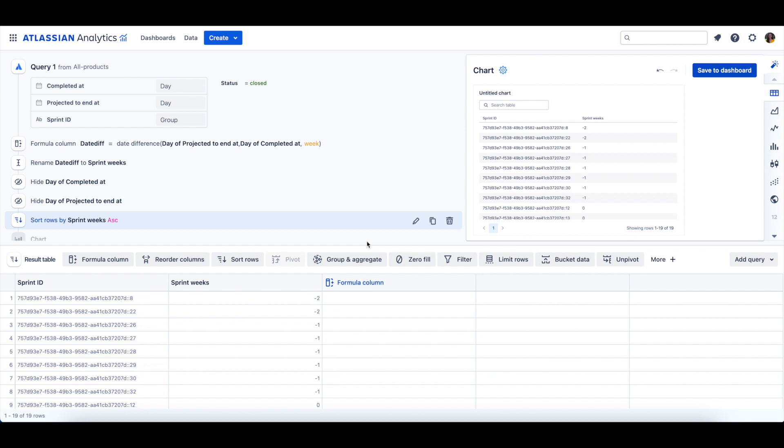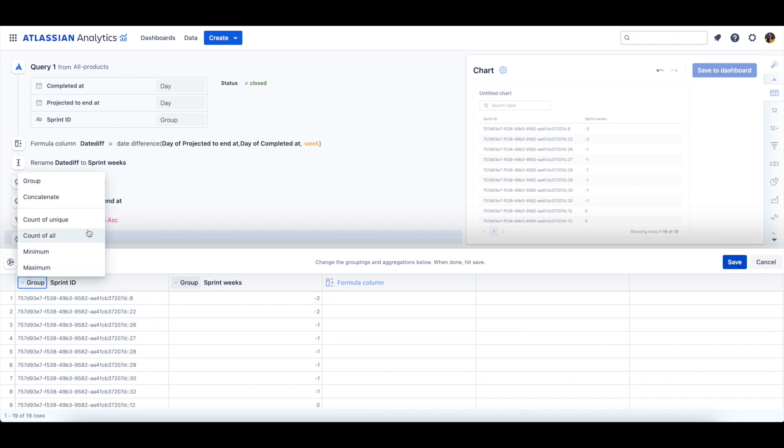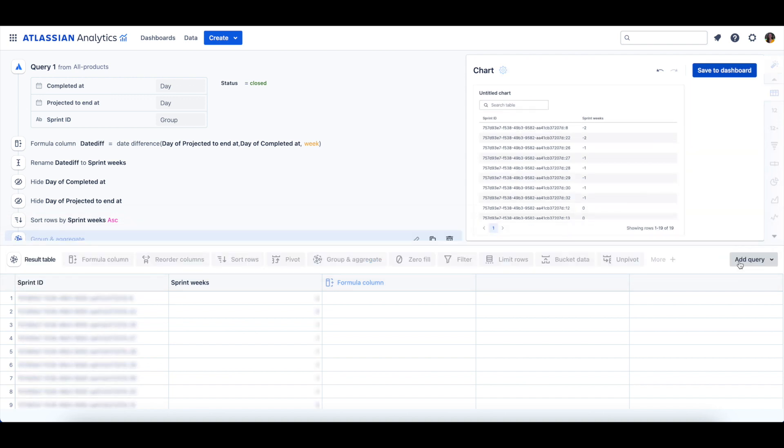Now, to get the count of Sprints per week length, we can add a Group and Aggregate step, where we'll group by Sprint Weeks and get a count of Unique on the Sprint ID column. And we can click Save.